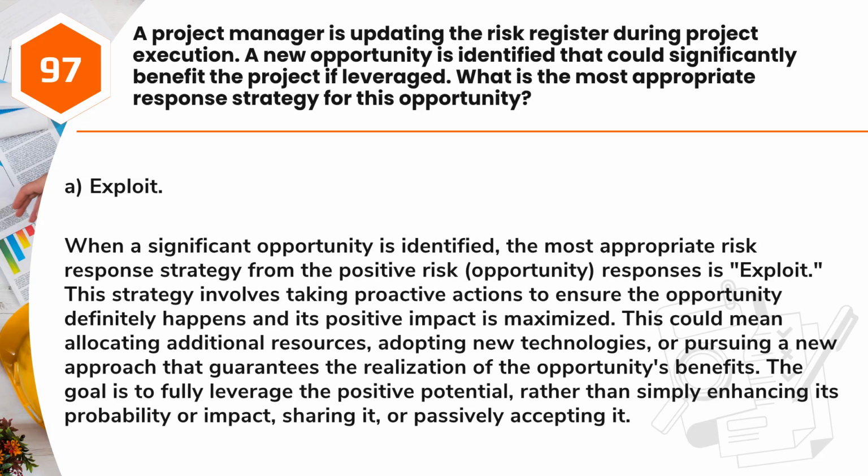Answer: A. Exploit. When a significant opportunity is identified, the most appropriate risk response strategy from the positive risk, opportunity, responses is exploit. This strategy involves taking proactive actions to ensure the opportunity definitely happens and its positive impact is maximized. This could mean allocating additional resources, adopting new technologies, or pursuing a new approach that guarantees the realization of the opportunity's benefits. The goal is to fully leverage the positive potential, rather than simply enhancing its probability or impact, sharing it, or passively accepting it.